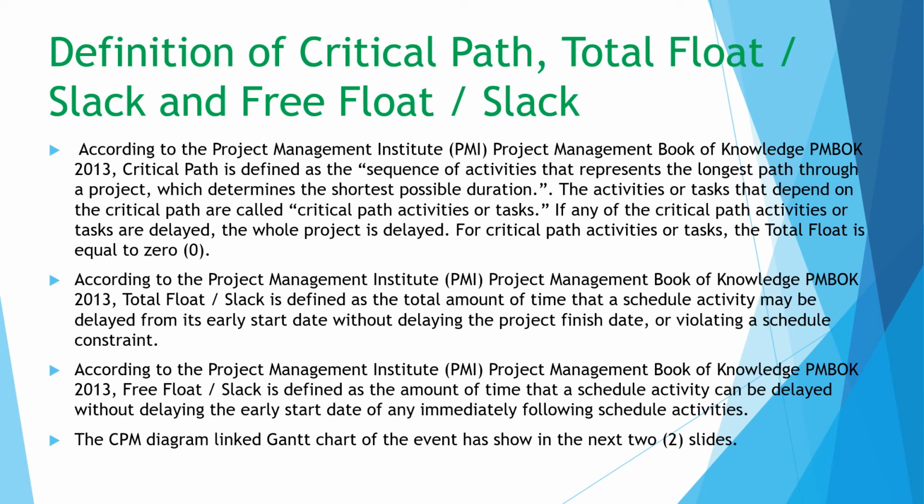And also, according to PMI, the free float is defined as the amount of time that a scheduled activity can be delayed without delaying the early start date of the immediately following scheduled activity.